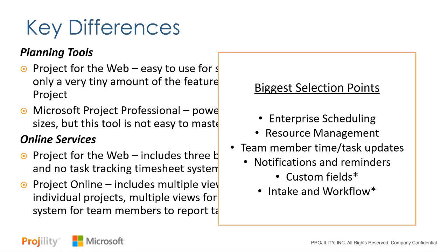So that's something that if you need custom fields of information, Project for the Web might not be a good fit. And again, around intake, workflow, and demand management, if these are core requirements, Project for the Web really probably isn't the right fit. If you want people to go in and build projects and manage them and do it in a very lightweight way, it's a great fit. But if you had a formal intake and request and requisitioning process and workflow behind the scenes, that's not part of where Project for the Web is today.